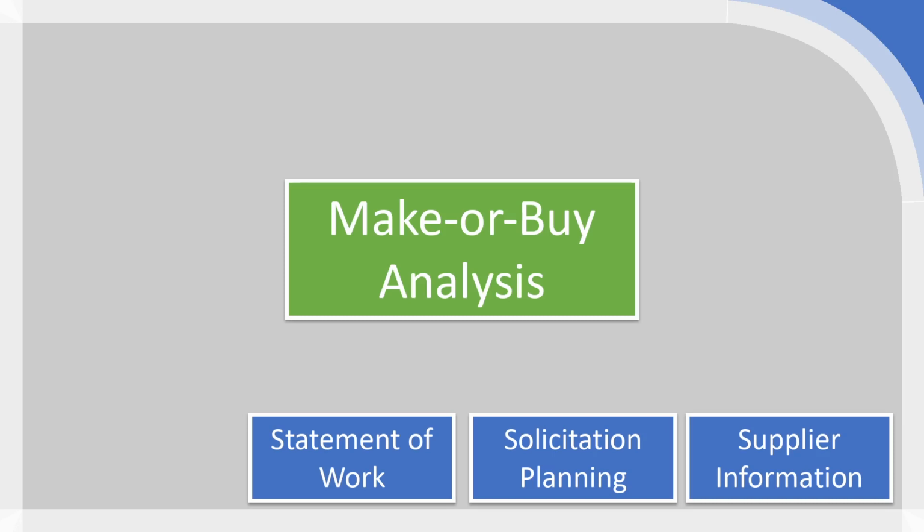Yes, when it comes to cost, we certainly do want to involve cost estimates, but even those are going to be relatively broad. This is the first stage of procurement planning, so we're not looking for massively detailed cost estimates, but enough for us to make a justified decision on whether we're going to develop our internal capacity or we're going to procure from outside.